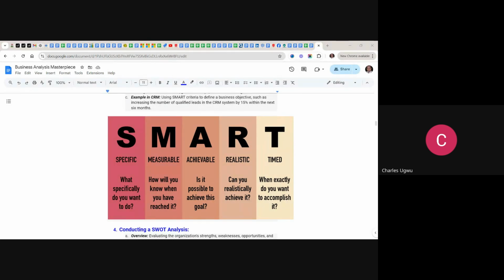Once you capture this, it helps you to discuss the requirement with the stakeholders. If they said it's 6 months and they are only allowing you to hire 2 bricklayers, it's up to you to ask, are 2 bricklayers enough to build this? You need to plan. If they are not enough, you should know the number of bricklayers you need to hire in order to finish it before the 6 months.